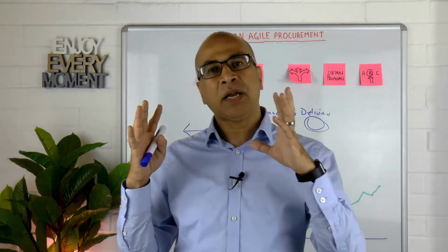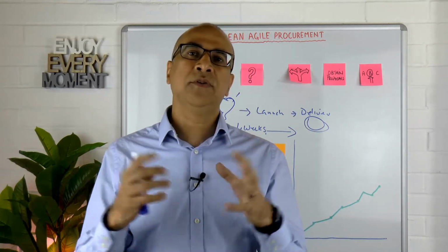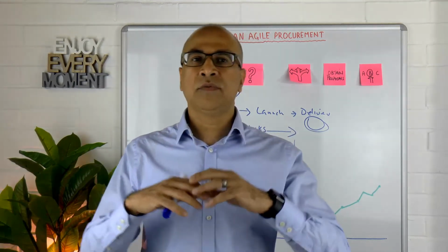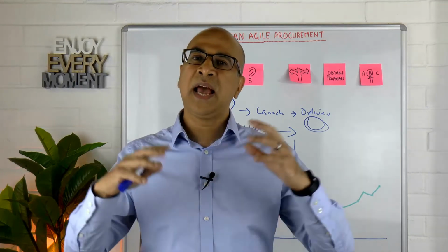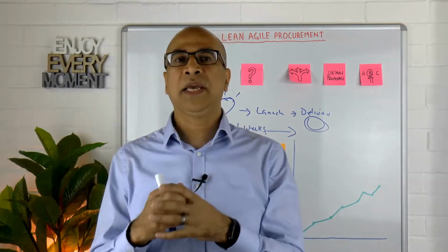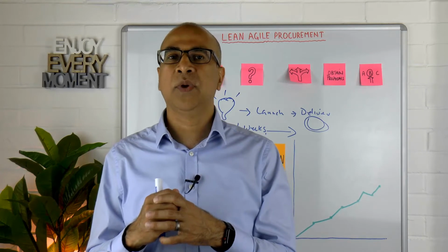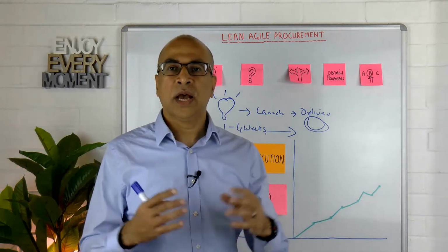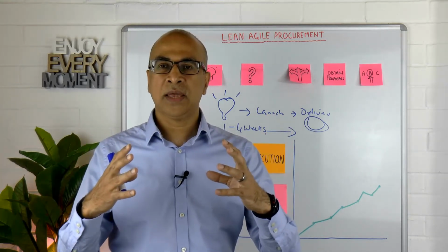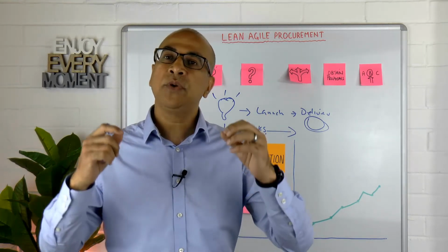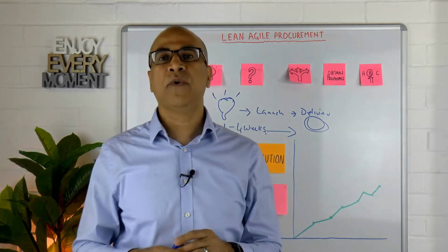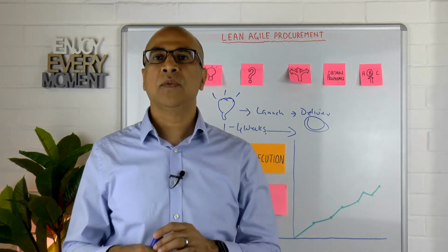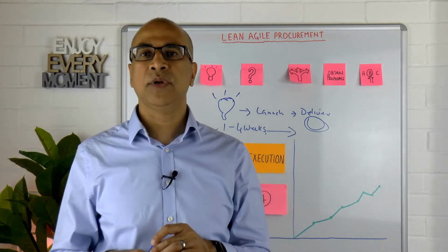So typically this is about a 2-day session, not dissimilar to a PI planning event. You've factored in aspects of design, and you've got the roadmaps coming through there, and you even have potential for agile contracts coming out off the back of this as well. Okay, so now we've got this powerful session where we've got the vendors working together, collaborating together, but you can also see how they are performing in terms of the way they communicate with one another, and also in the way in which the solutions that they are coming up with.